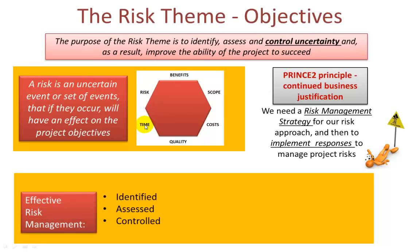So what do we need to do with risk? Effective risk management means identifying all known risks at any given point in time, then assessing the risk and taking some form of actions — in other words controlling the risk and making sure those actions are having the desired effect. We also need to generate a risk management strategy which describes our risk approach and then implement responses to manage project risks. The risk management strategy is a how-to; every project is different and we need to set out a clear approach to manage the risks within a given project.